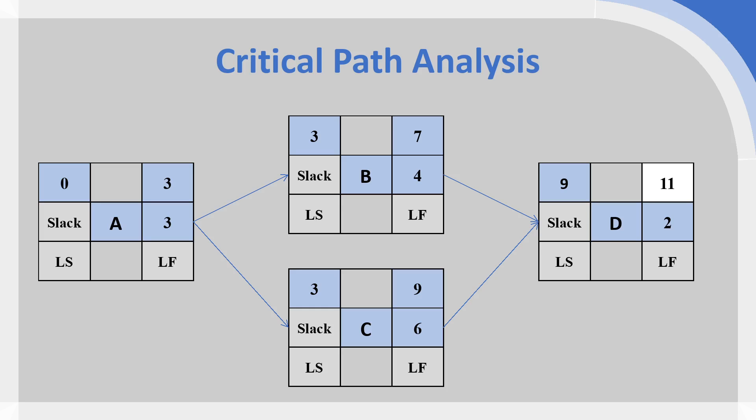Now we want to understand if there's any slack in our network diagram. The finishing activity will always have the same early start and early finish as its late start and late finish, so we put late start as day nine and late finish as day 11 for activity D. We've just done a forward pass — left to right, early start to early finish — and now we're going to do a reverse pass: late finish to late start, right to left through our network diagram.